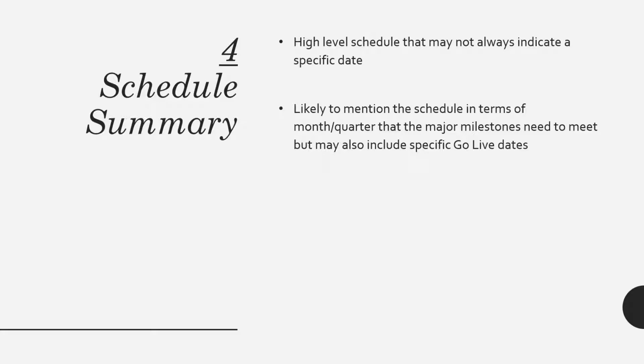Okay, so don't be surprised if you get a project charter which has specific dates about everything and not the high level, month or the quarter dates. Most of the project charters, although, will almost always have a go live date, a specific go live date. So your 50-story construction of the building project may have a specific go live date of, let's say, 1st of August 2018.